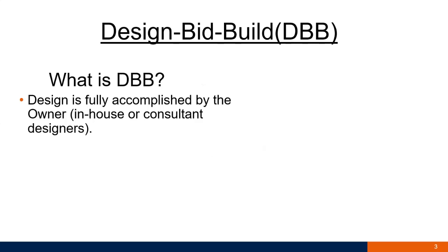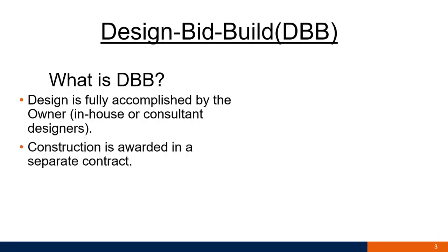In our case here it is the Florida Department of Transportation, because most or all of the data that we are going to discuss in this presentation, we acquired from the Florida Department of Transportation project database. So the design is fully accomplished by the owner, or what we call in-house. In-house also might include hiring an engineer or a consultant to do the design for you. And the construction of the project is awarded in a separate contract.